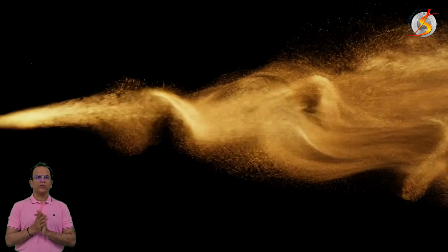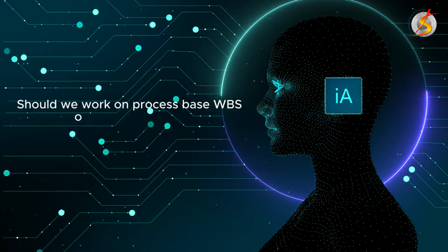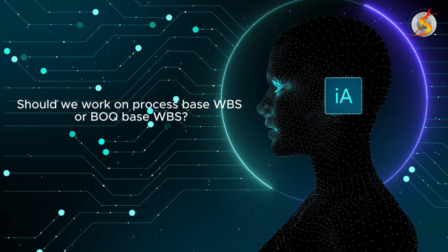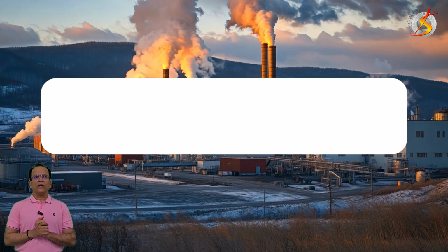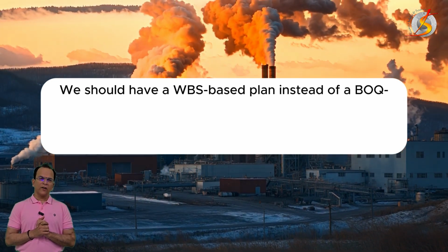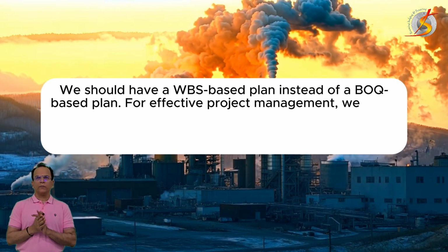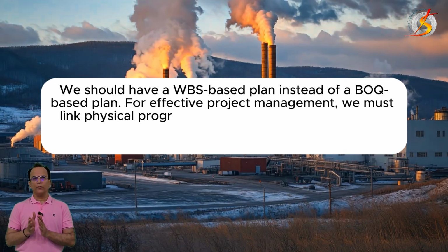Okay, what's the next question? Should we work on process-based WBS or BOQ-based WBS? We should have a process-based WBS plan instead of an equipment-based WBS plan, or you can say a BOQ-based WBS plan.